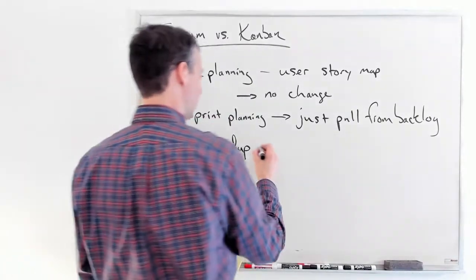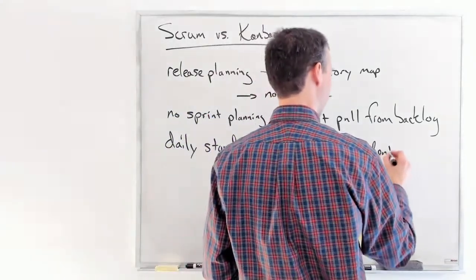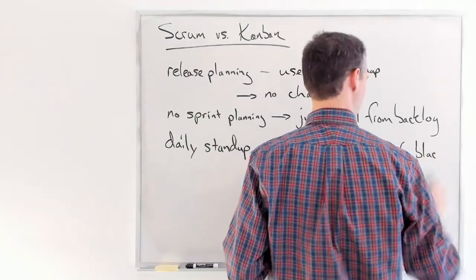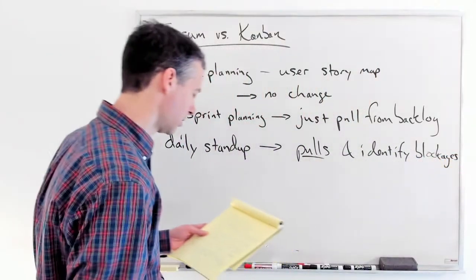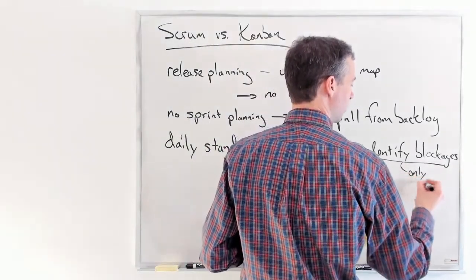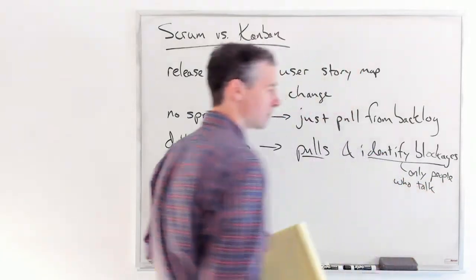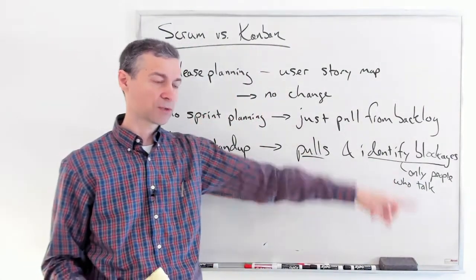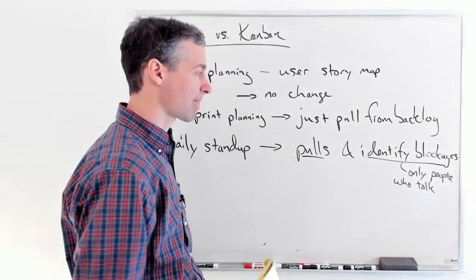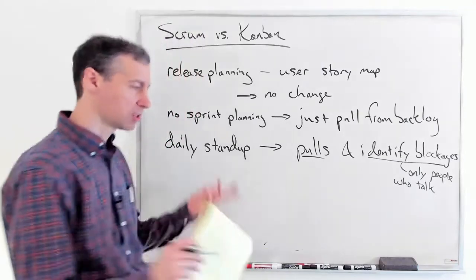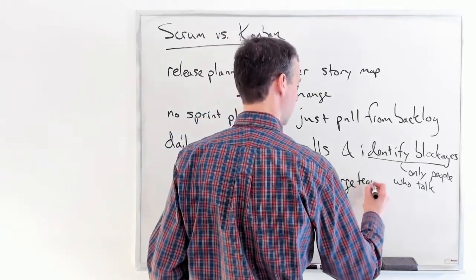What about the daily stand-up? This is all about doing pulls and identifying blockages. We update what's done first before we can do the pulls, then we identify our blockages. When we can see from the Kanban board that stuff's not flowing through it, we talk about why the work is stuck. We talk about problems — we don't just give status updates. This lets us handle a large team actually very nicely.